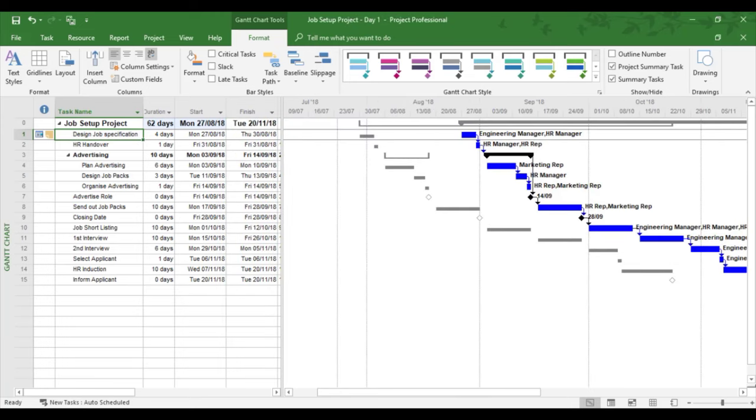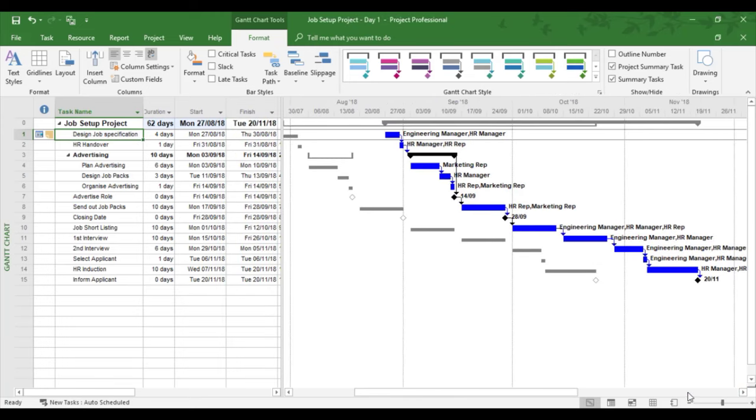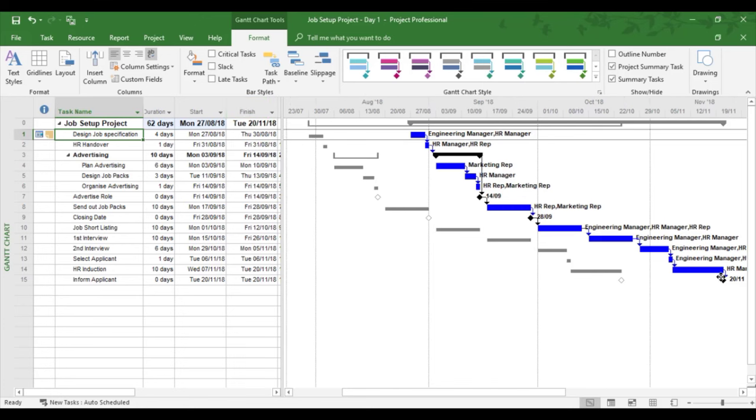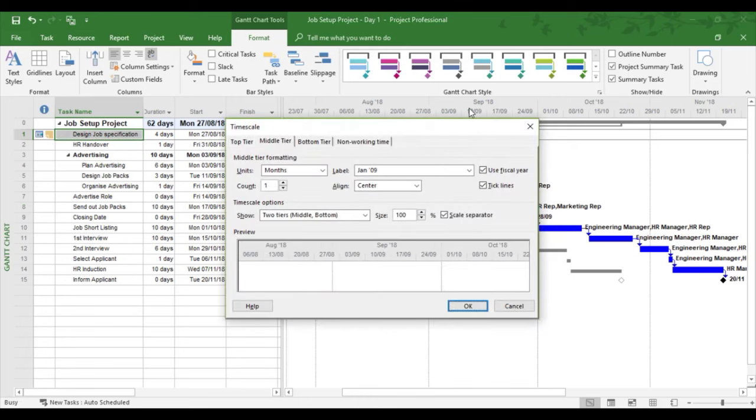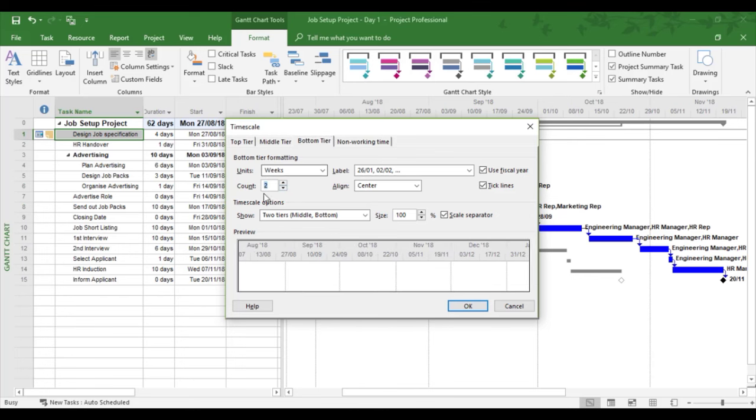I'm going to click OK. Now that looks much better for printing purposes. I'm going to try and get the graphics as close as I can to the columns. I'm losing a bit of text on the end. If I want to get it perfectly in, I might go back to the time scale. The bottom tier I want to go to maybe weeks to the count of two, every fortnight within the month.